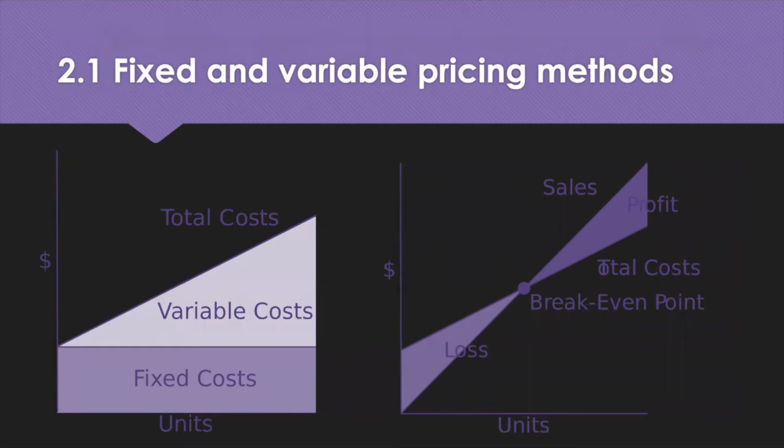Now, cost management is going to be one of the most crucial functions in programme management. Managing cash flows and inflows requires well thought through strategies, which will take into account the complexity and nature of the programme. The impact of procurement on cost management is really significant. The purchases of bought-in goods and services typically account for between 50 and 80% of the programme's total cost. So approaches to strategic cost management should reflect the crucial role of procurement in this area.